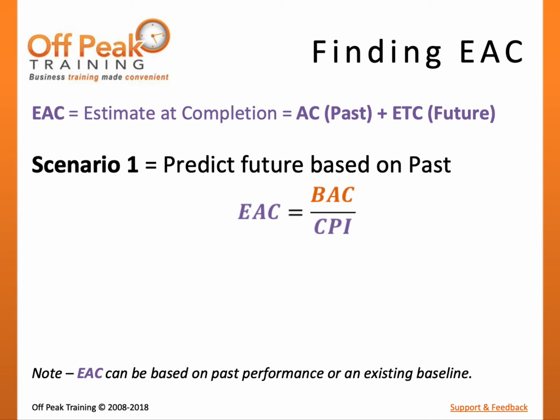cost performance index. In this scenario, if your CPI is equal to 1, indicating performance at plan, then your EAC will be equal to your BAC. Further, if your CPI is less than 1, indicating poor performance, then your EAC will be more than your BAC.